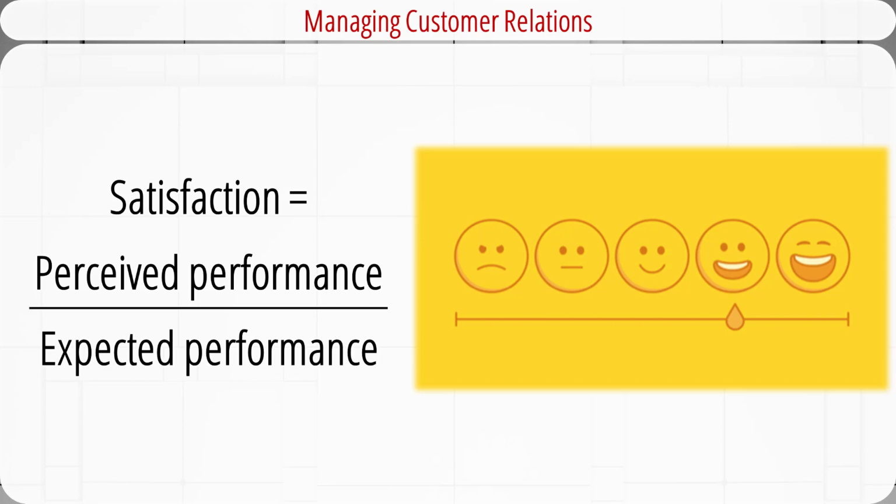Significantly exceeding expectations typically entails additional costs. The most profitable arrangement occurs when the customer's expectations are only slightly exceeded. For example, completing a construction project 2 months ahead of schedule may involve significant overtime expenses. Similarly, exceeding reliability requirements for a new electronic component may involve considerably more design and debugging effort. Therefore, you should strive for a satisfaction ratio of 1.05, not 1.5.